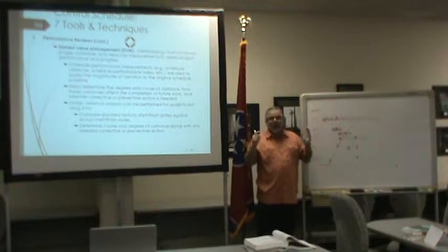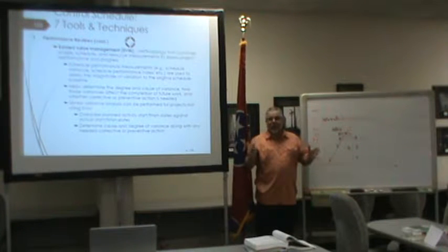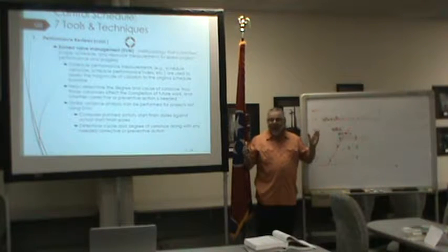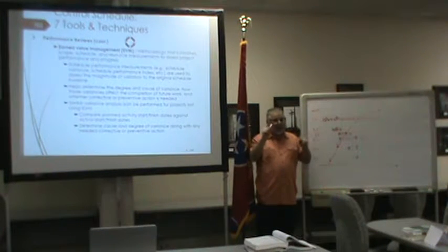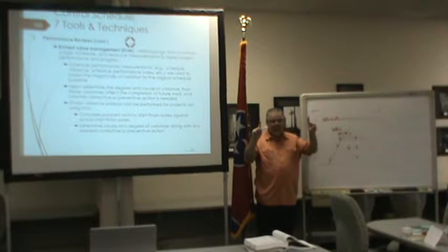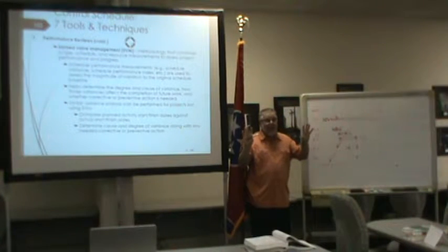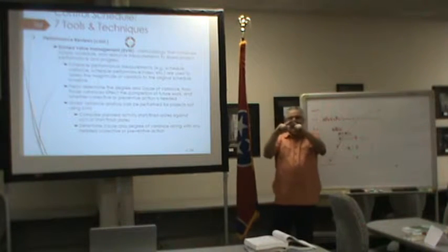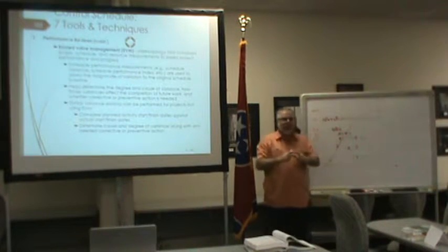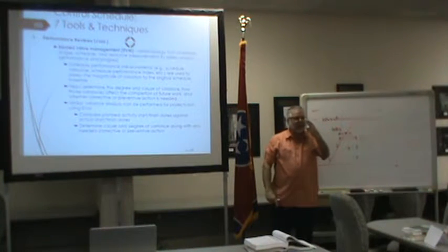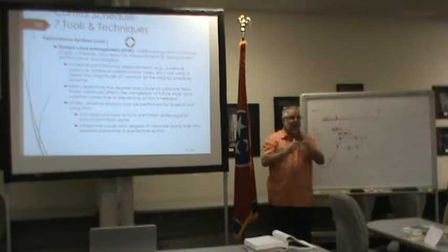Okay, 99% of the people say we're overspent. What do the other people say? I heard somebody say it depends on what we got done, and somebody said it depends on the scope you've accomplished. Okay, same thing. So in order to do earned value management, I still have to have all 3 pieces. How much time has passed, how much money did we spend, and how much work did we get done.